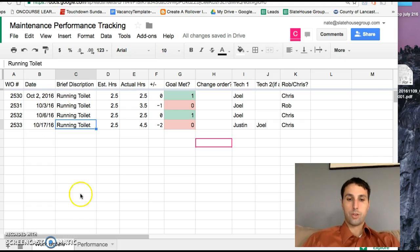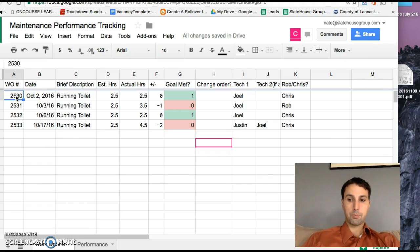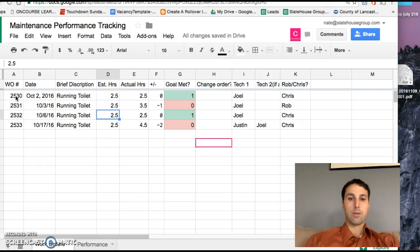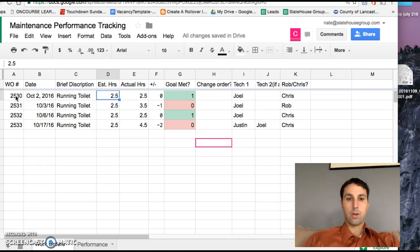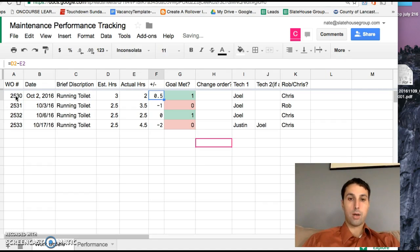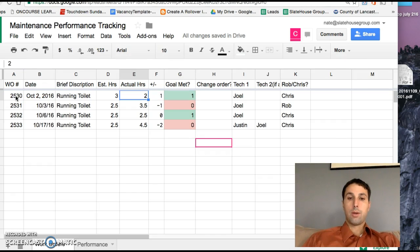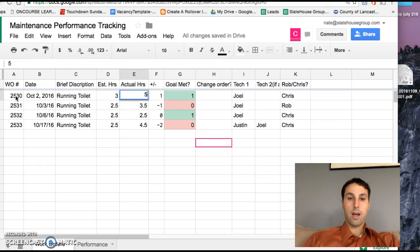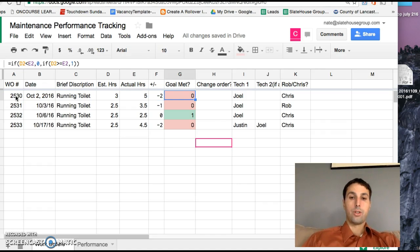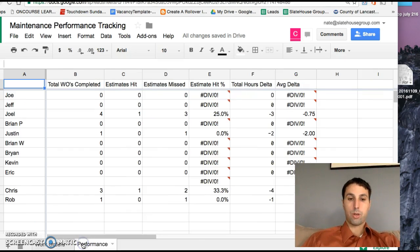Here's just so you know, here's how we're going to be tracking it. So every work order will go in over here and then we'll have the estimated hours. This is just dummy information but it'll be like we think it's going to take three hours to do a job, it took you two hours so you're in the green here, you met the goal. If you actually took five hours, that's not so good, you didn't meet the goal.